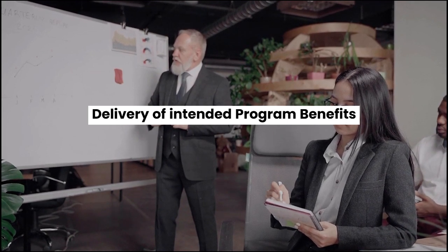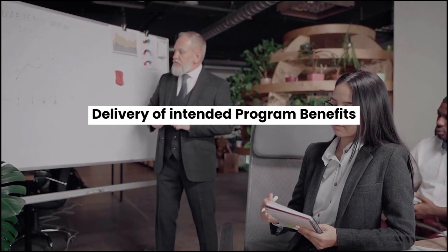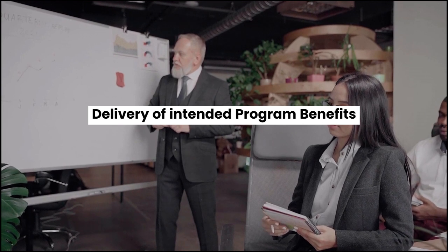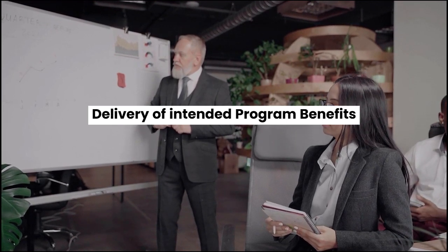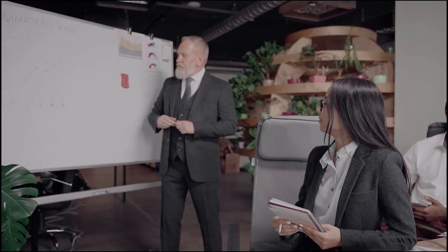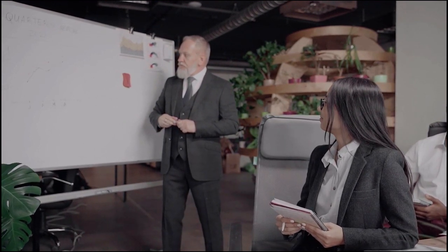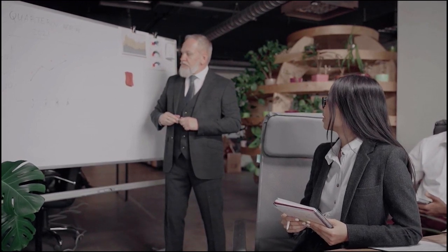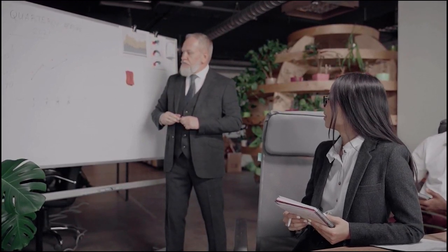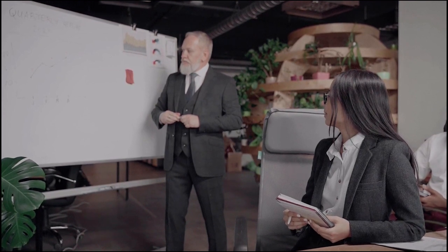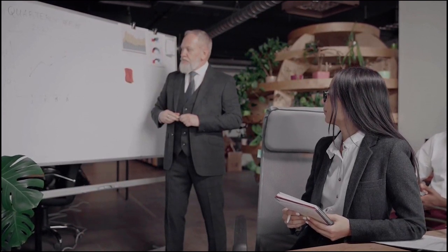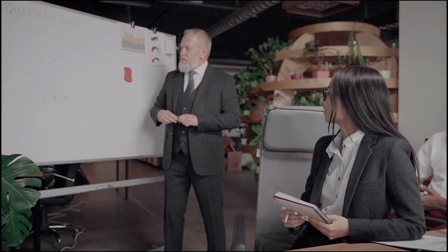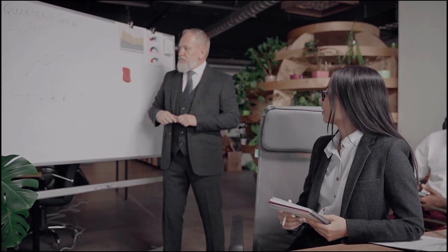It's possible that there is a window of opportunity when a particular planned benefit can be realized and generate real value. The window of opportunity may have been met or compromised by actual program or component events, such as a delay, cost overrun, or scope reduction, as determined by the program manager, program steering committee, and key stakeholders. Additionally, investments may have a time value, making it more costly for component schedule changes to occur.